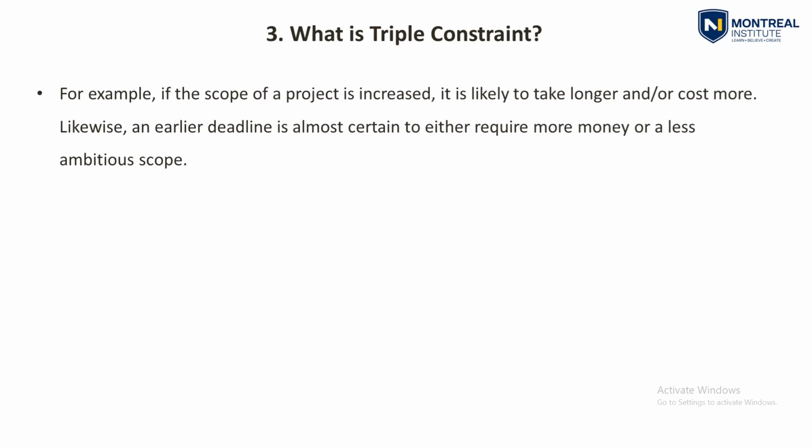Otherwise, if you take more time, it will cost more. If you are in construction and you take more time on the project, you will incur more preliminaries cost and running cost. If you finish the project on time, maybe you need to spend on double shifts or extra materials or resources to complete the project on time. So it will cost more.